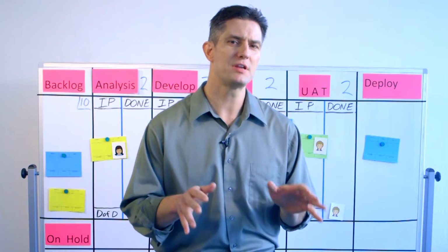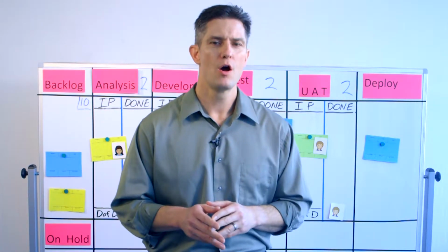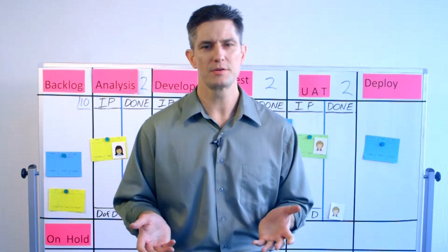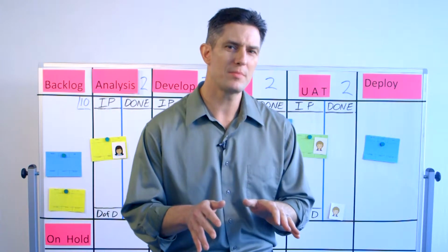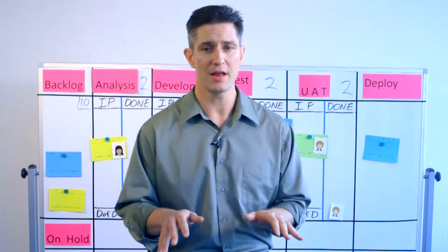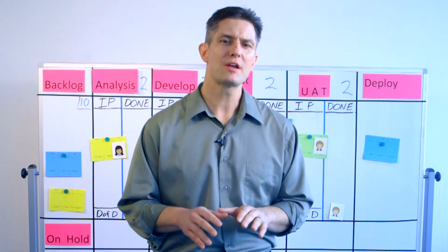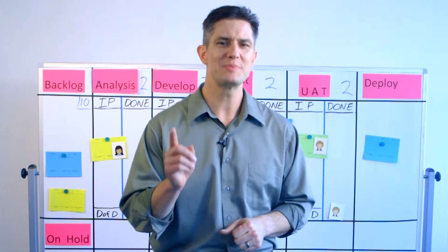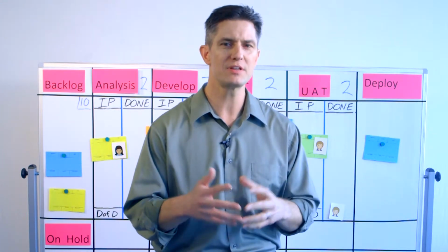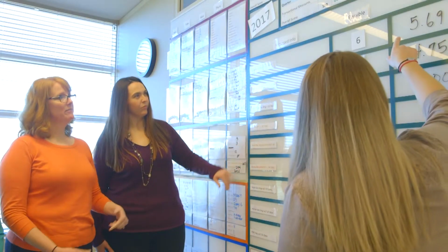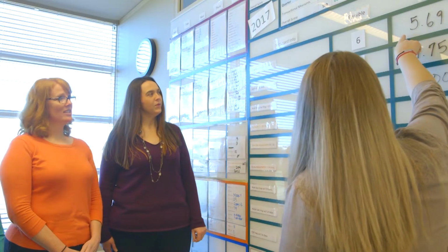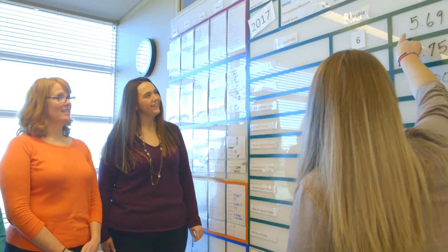Now, let me share another tip that I found extremely helpful. We recognize that managers and stakeholders are always welcome to observe a stand-up, but unless they are a core team member, I would suggest not having them every day. Instead, I recommend having one day a week where you specifically invite them to come and observe the team in action, but then the after meeting that day is for the team to walk the board, see who's doing what, and ask any questions about how things are progressing.